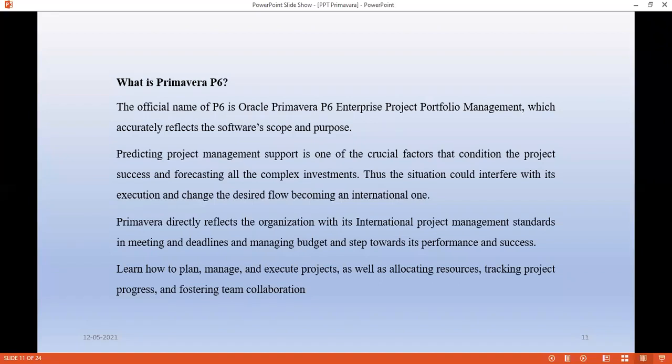So first you require the activities. Activities are nothing but the work which has a certain duration to complete in the project. Those activities you have to list, and how the dependencies of those activities will be, we are going to implement in the software. Now, how is the software going to calculate? We have so many methods to calculate: CPM methods, PERT methods. We have different methods to know the dependencies of our project activities.